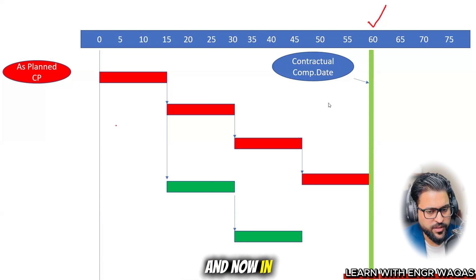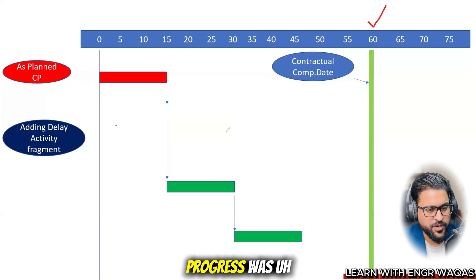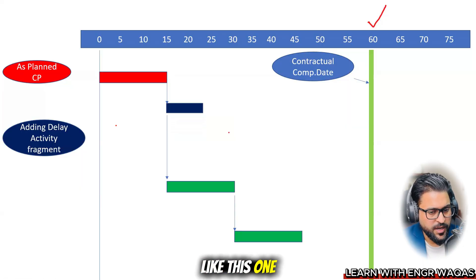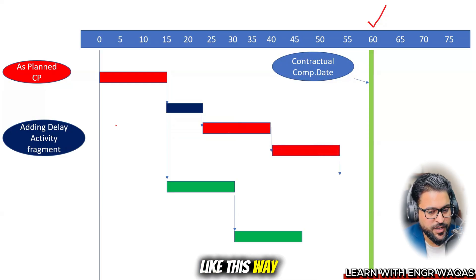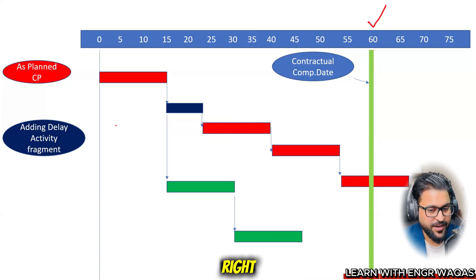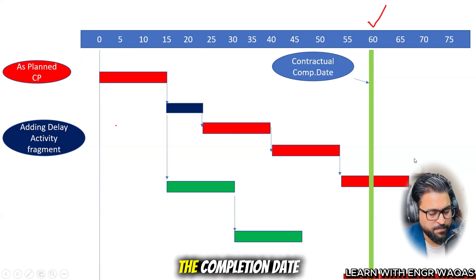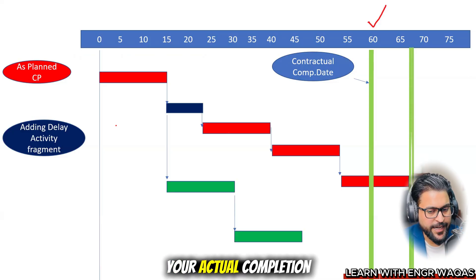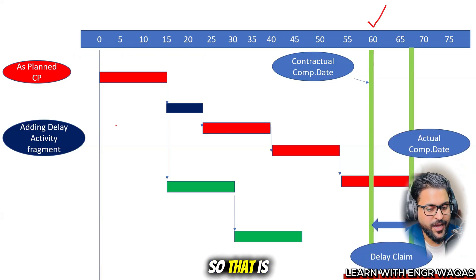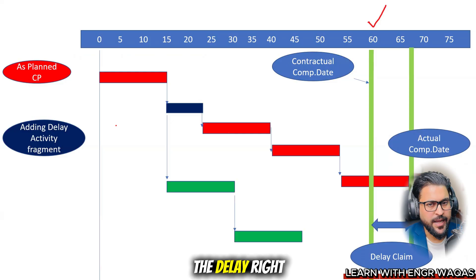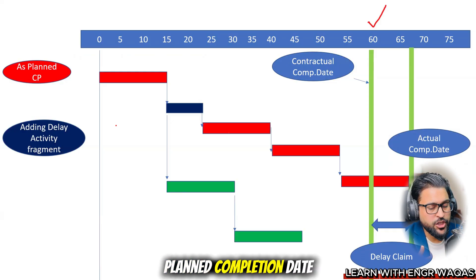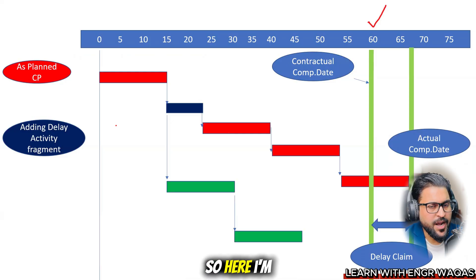In the next slide you can see how an unforeseen delay event has disturbed the original baseline — the logic has shifted. Your plan moves forward: you planned to complete on day 60 but the completion date is now pushed out. You can see the impact of this delay: the project was pushed from the original planned completion date to a revised completion date. That gap is the actual delay.